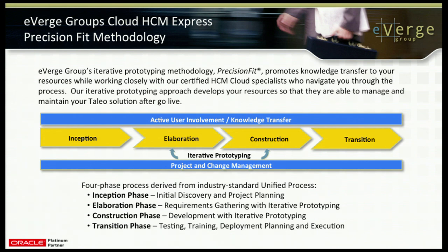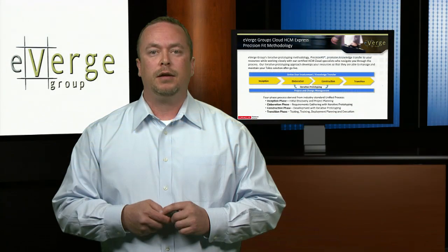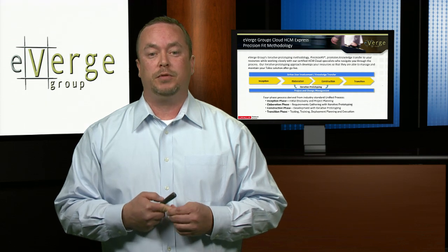We start with inception, which is really the upfront planning. We determine all of our governance at that point in time. How are we going to do status reporting? How often are we going to have status meetings? Who's involved with those particular processes? We go through, develop a project charter, have a kickoff meeting, and really all that defines who's going to be doing what, the responsibilities from both eVerge's perspective and the customer's perspective, what are we implementing, what are the time frames. It's really all that upfront project planning piece that goes along with inception.